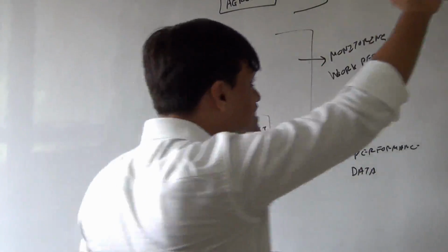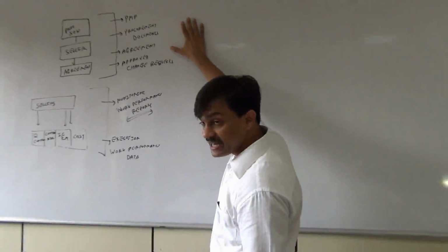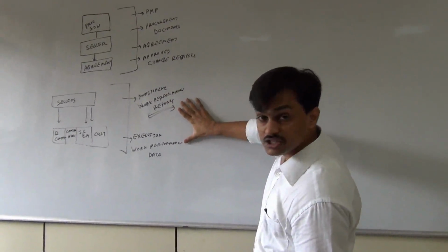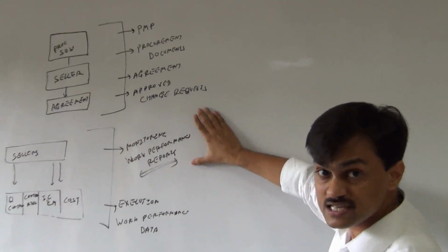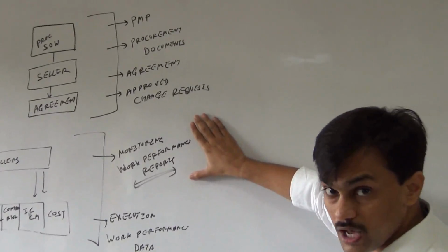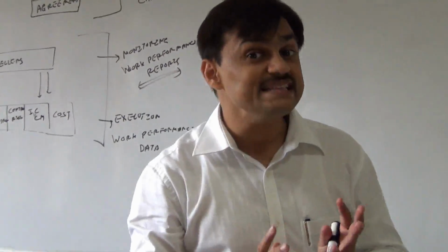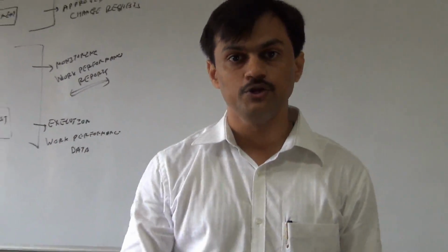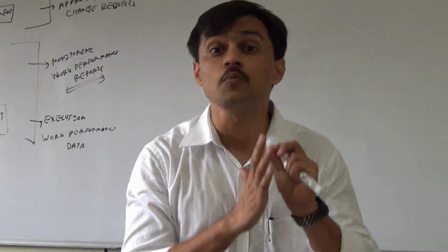So with these inputs, we got the information about the planning, the plan which we made for our procurement work, and the current status: what is getting done, what are the variances, and where the performance is as far as the seller is concerned. Now, after getting this input, while performing or controlling the procurement, you need to look into 4 dimensions. These dimensions are managing adherence to process.